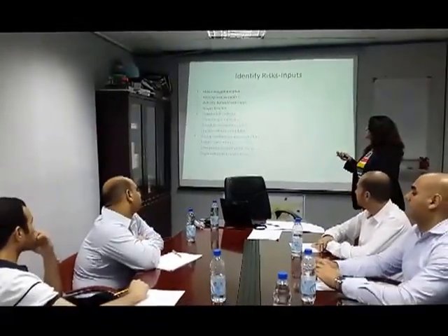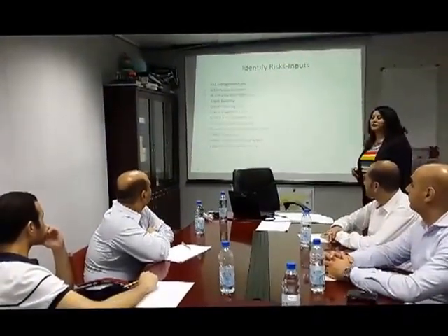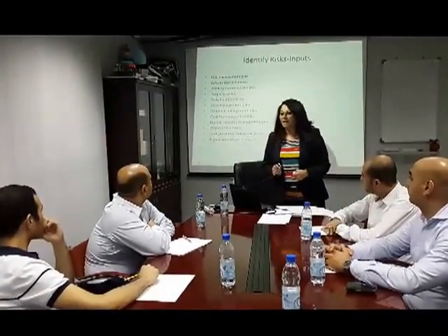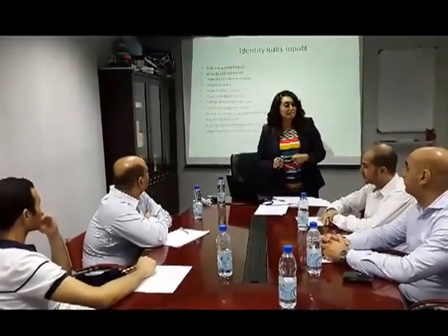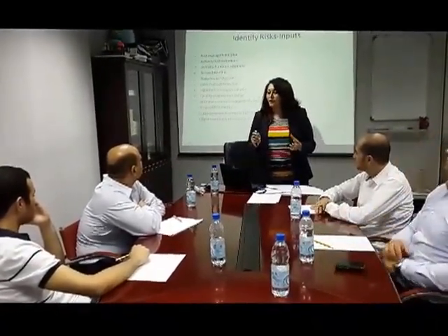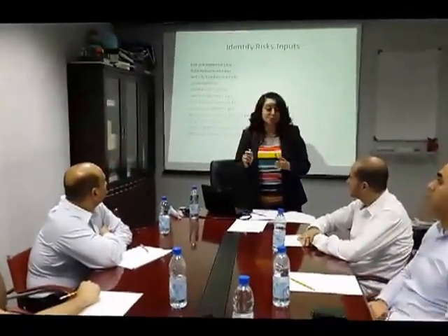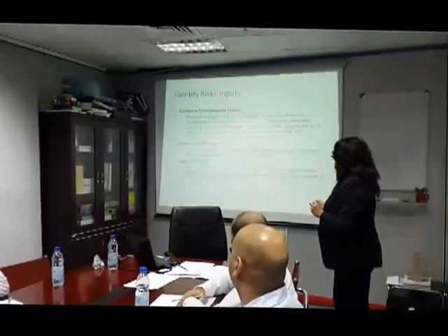Now, why do we need to have a risk management plan? How does that help us in identifying risks? Why is it an input to risk identification? It is an input because the risk management plan has so much information. First of all, it tells us about the methodology, I mean the approach and tools that we use in risk identification. Also, it tells us who does what in risk management, meaning the roles and responsibilities of people.